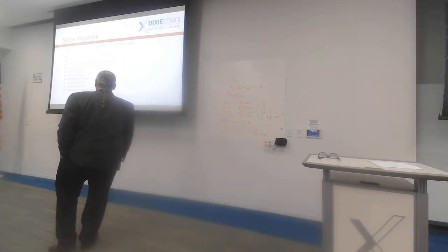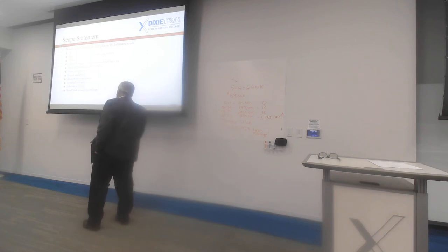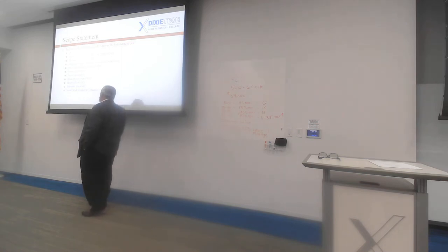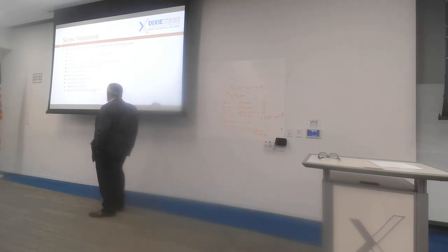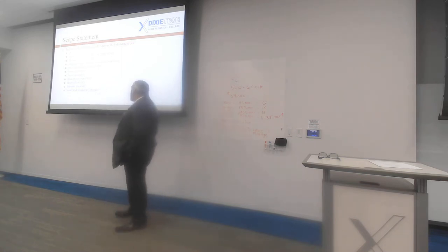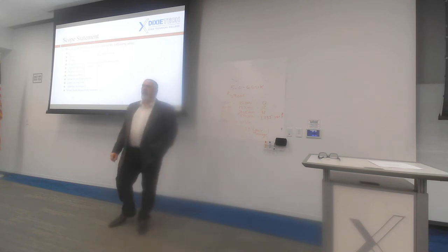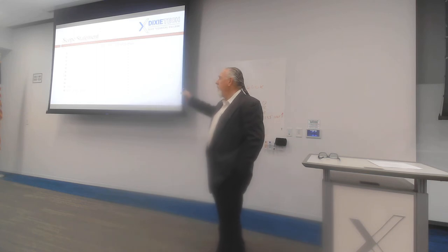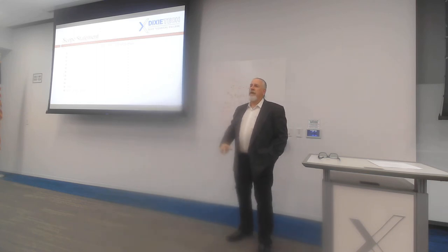What is included, what isn't included, what the requirements are, what we are going to deliver, what constraints we have, what assumptions we're making, how the project initially is going to kick off and be organized, what risks we know about, what the schedule milestones are, and what the map looks like, the work breakdown structure. We will need a work breakdown structure for your Christmas party.